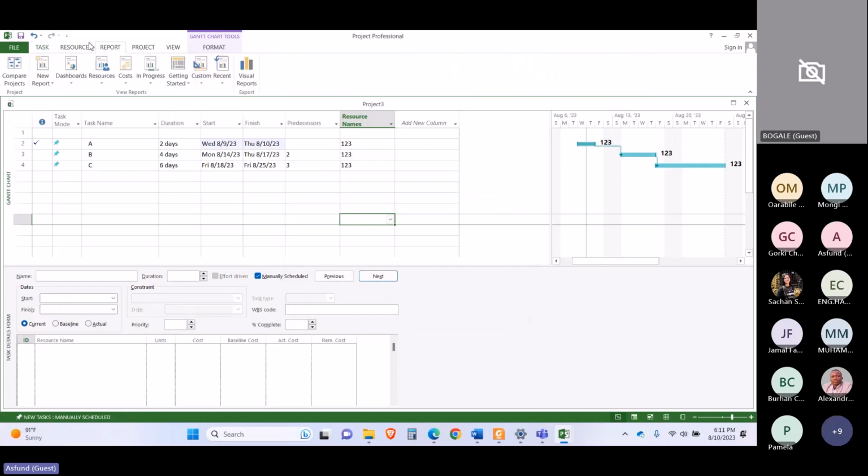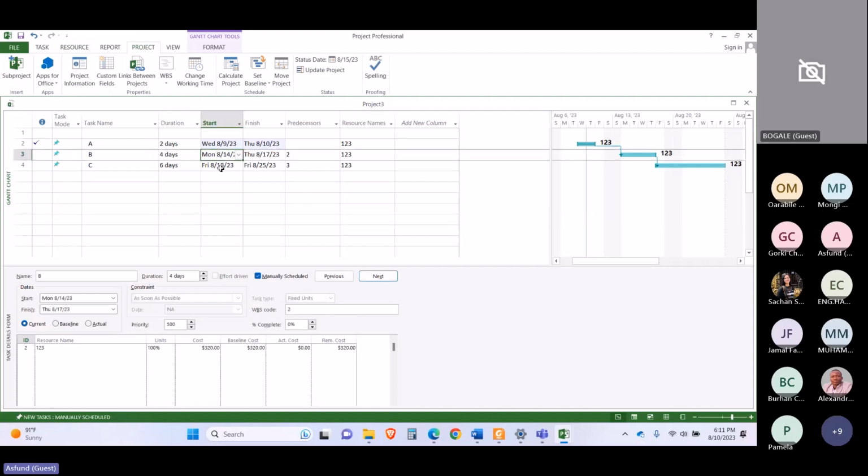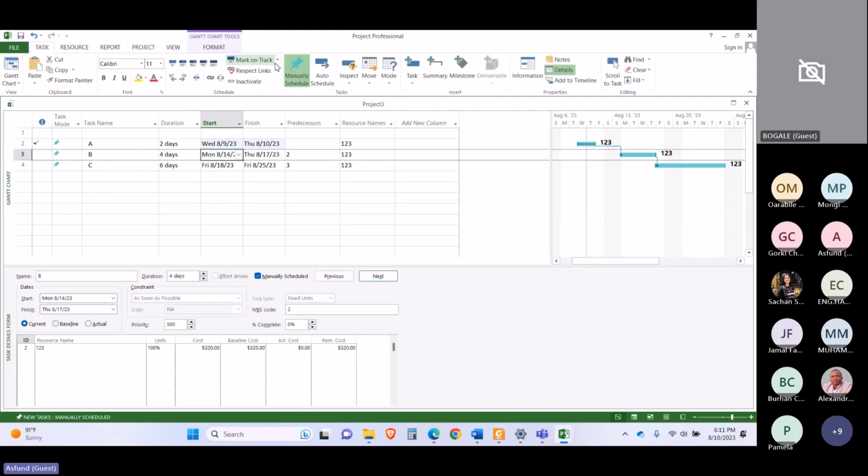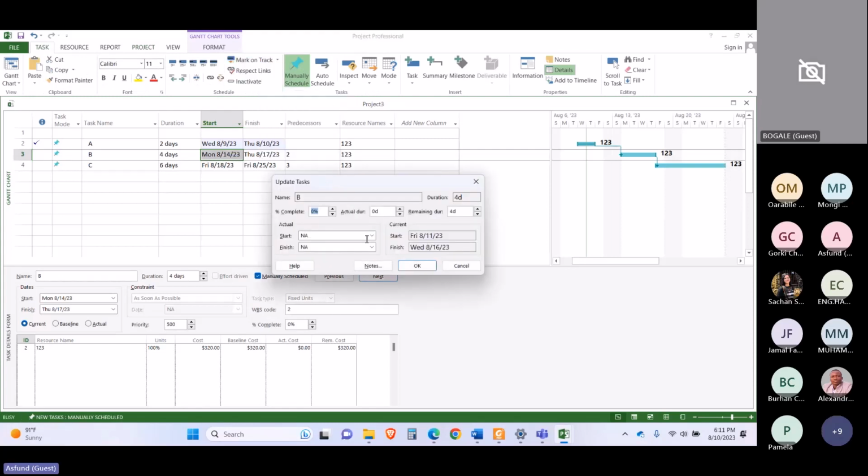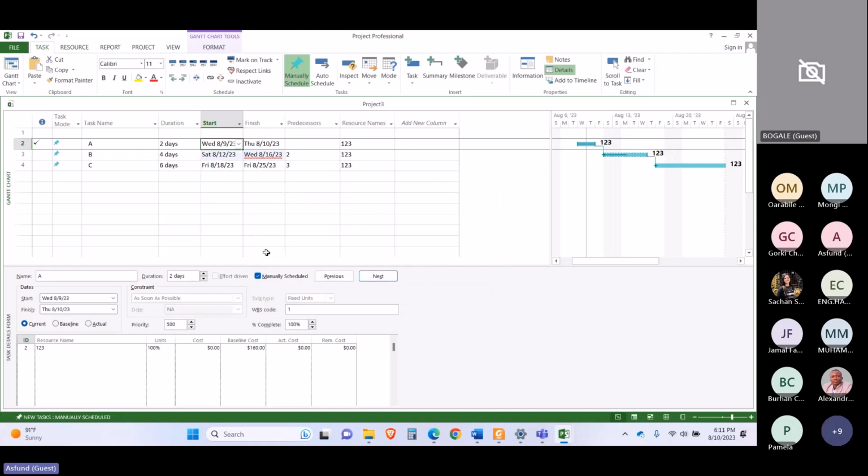Okay, and this activity also gets started. It started on, let's say, the 12th, and it has a percentage complete of, let's say, 45, and I select OK. And as I uncheck the actual cost computed by project, I have to manually enter it here. So in this way, let's say the cost exceeded our baseline and it was $200, and I click OK.